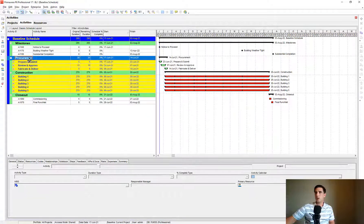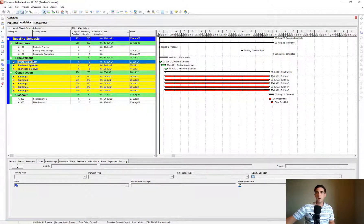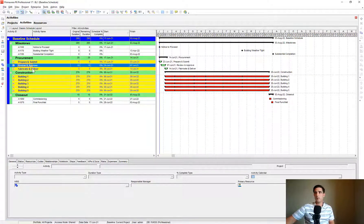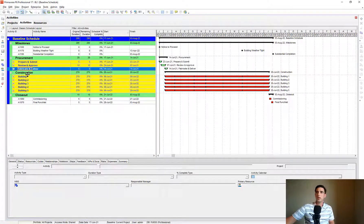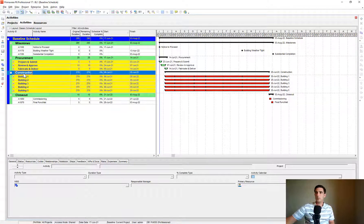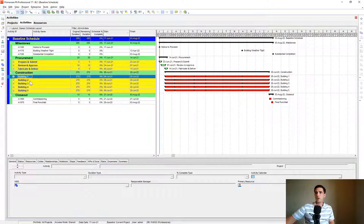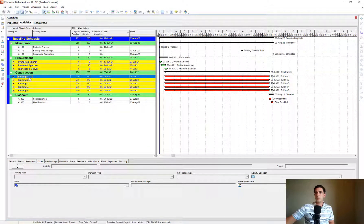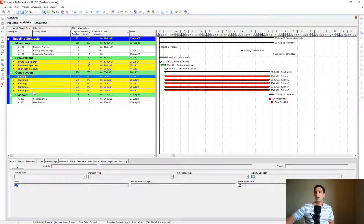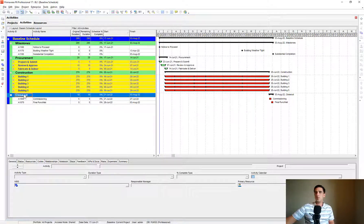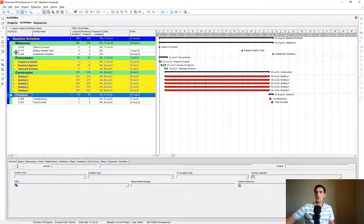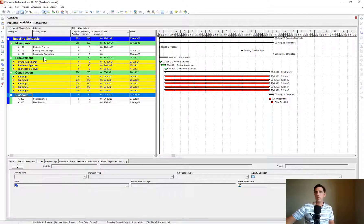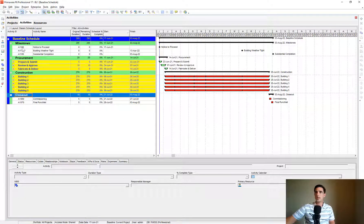Milestones, Procurement, and underneath Procurement we have Prepare and Submit, Review and Approve, Fab and Deliver. We have our Construction, and then we have these five children underneath Construction for our five different buildings. And then we have our Closeout Section. So this is the organization we're going to follow for our project.